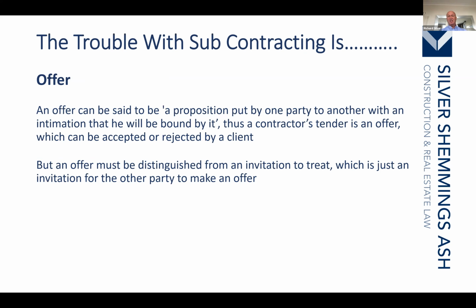So far as offers are concerned, the simple thing is we must distinguish between what is an offer and an invitation to treat. An invitation to treat is when the contractor, for example, goes out and seeks tenders. What the contractor says is, dear Mr. Subcontractor, please can you submit your tender based upon X, Y, and Z. And what generally comes back is something completely different.